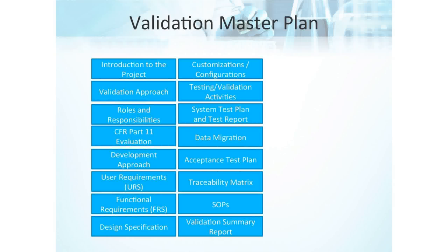Right. Okay. So data migration: if you set up a system and you don't have any data in it, it's probably not usable. You probably are migrating some data. You might get lucky and not have to migrate data. Data migrations are a critical area that often doesn't get enough attention during the implementation. Everyone thinks it's going to be easy. We'll just populate a spreadsheet and dump it into our new system. But most projects have some level of data migration. And even an upgrade frequently has data migrated from integrated systems, where rerunning the interface will establish that data relationship in new or modified code.